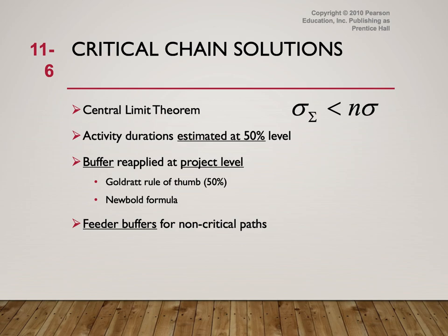This is basically for your info, just FYI. Here we have the omega summation is less than number of time, and multiple by omega. So we have this, technically a central limit theorem. Basically what they are telling you is to buffer a project, but limit it to 50%. For example, you need to do a project within 1 week, maybe you can put 1.5 weeks, not more than that. Which we will take a look at later on.